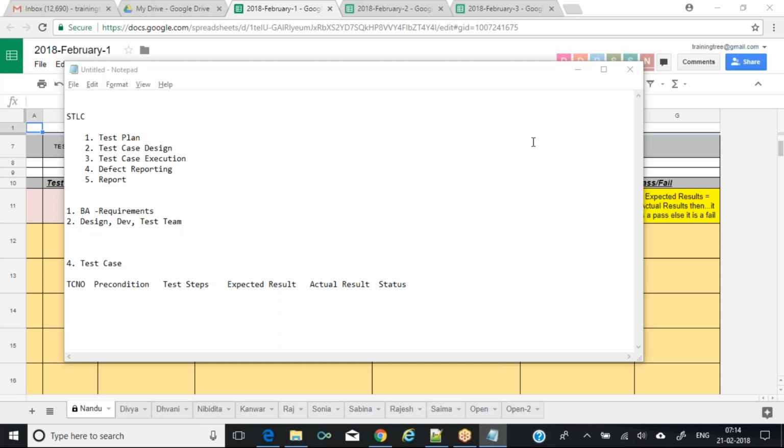After gathering that information, they should not give it to the team members directly or orally. First, they should update the requirement document, and that document should be shared with the team members one more time. That's how it should happen. Otherwise, if you communicate something orally, later it will create a lot of issues. So always that new information should be documented there.